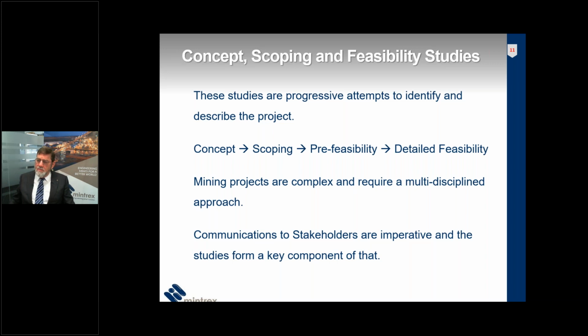With mining projects, they tend to follow a sequence of studies, concepts being explored at high level, so that you eliminate the least attractive options, then scoping studies providing definition and identifying trade-off study requirements. All studies should be subjected to fatal flaw and peer review.